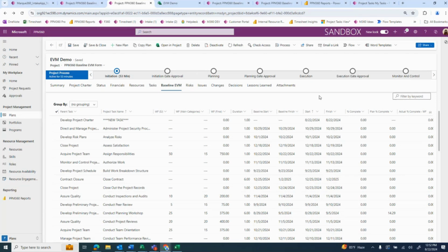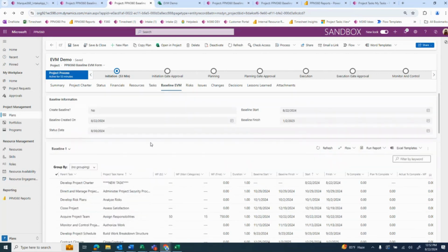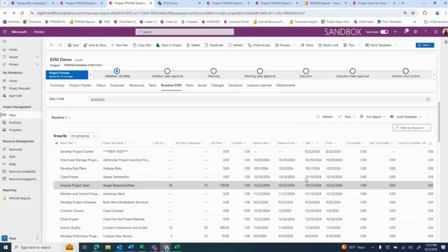So you can see what's planned. So I would set my baseline here, right? For example, for this task here, I would just include in this view, effort. And when I set my baseline, it would say baseline effort. And then I can look at my actual one. So I would add my actual effort here. So the same way I have this baseline start and this baseline finish for comparison, I could simply add baseline effort, actual effort. Got it. Does that make sense?